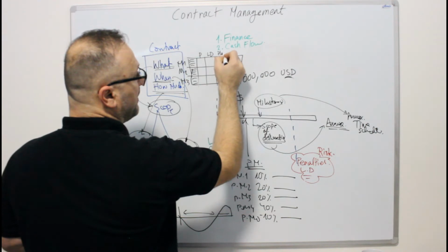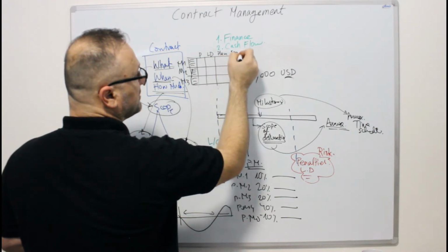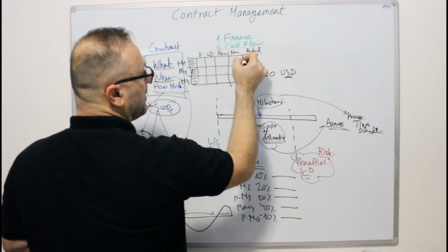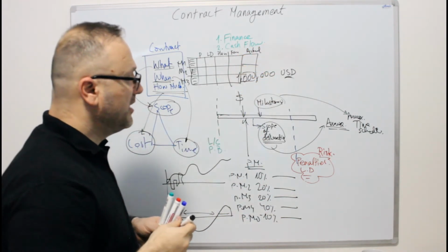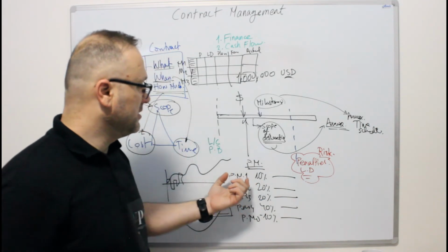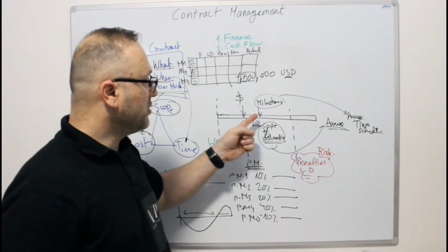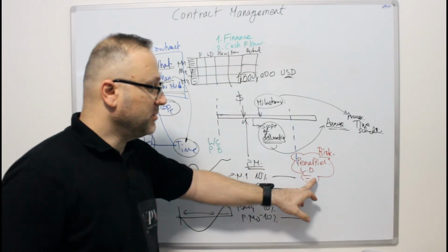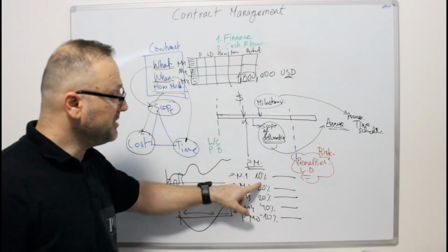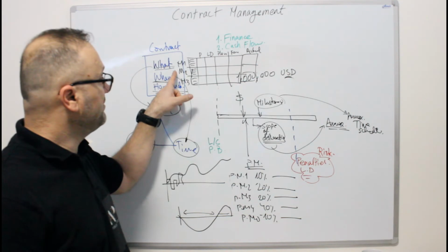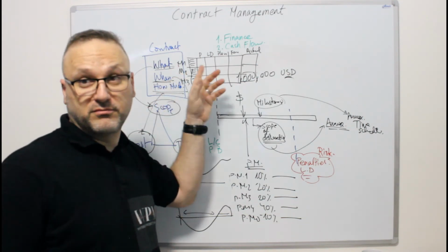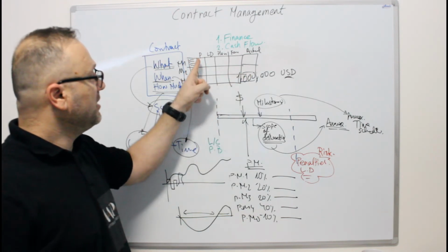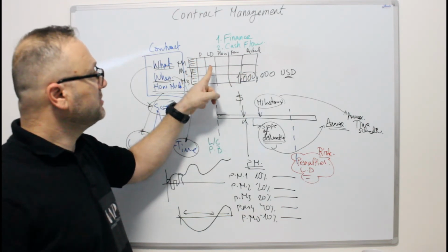And the plan, forecast, and actual. It means if I have a milestone, say mechanical completion, and this is under liquidation damage, and also it's a payment milestone, and it happens in month 2 of my project, I will write it down here and say yes, it's a payment milestone, 10%.